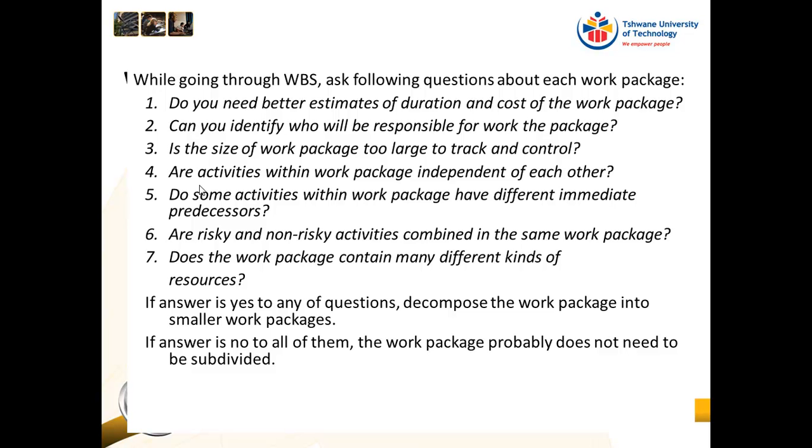What we want to try and do is separate the work so that risky work packages are defined separately from non-risky work packages, because then we know that now we are working on something that is risky and we had better track and control it a lot closer.